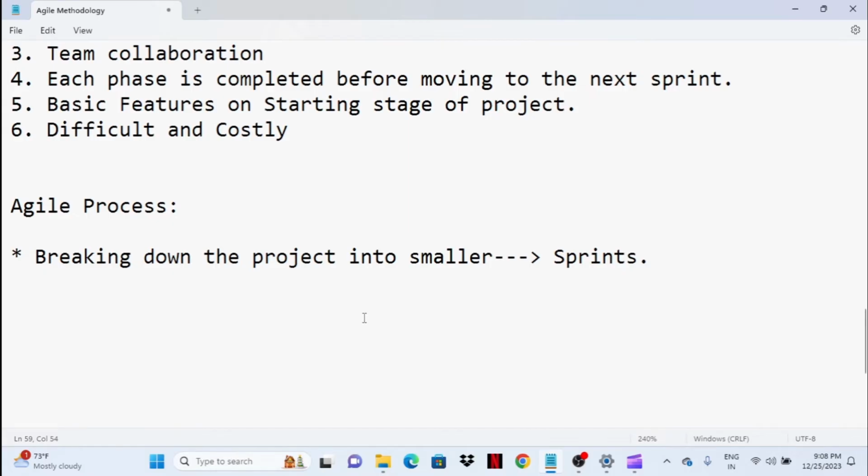Okay. Now here is where agile truly shines. So the answer is feedback. You present the functional portion of the application to stakeholders and users for their input. Based on their feedback, you can adapt and pivot and then make necessary changes for the next sprint. So not the current sprint. The current sprint is not disturbed. Any changes or any problems are handled in the next sprint only, so they take the feedback and implement those changes into the next sprint.